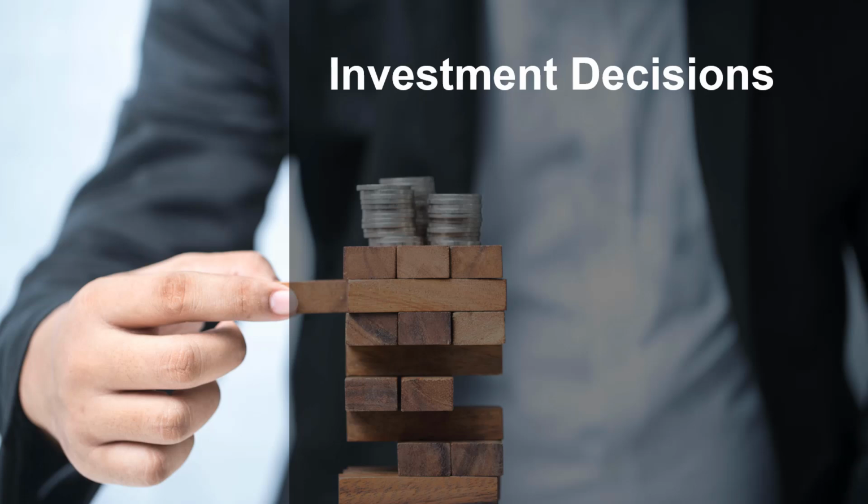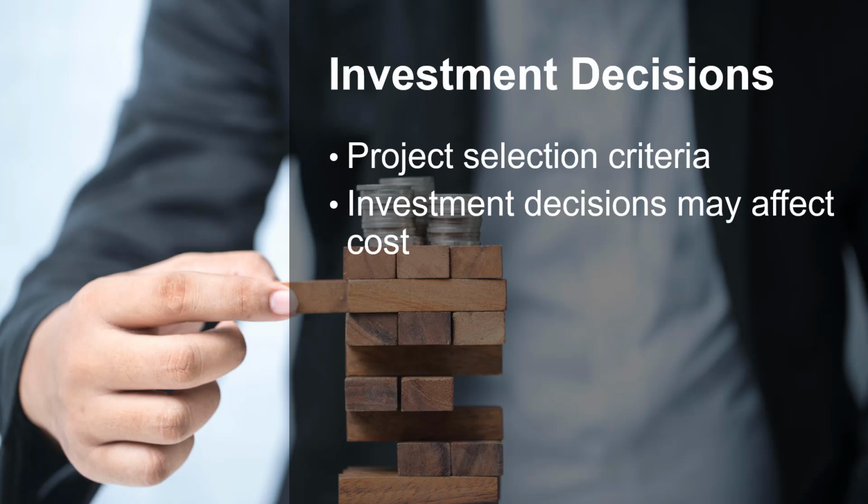options. Investment decisions are usually made long before the project gets to a project manager. Potential corporate initiatives are assessed based on high-level cost estimates, and the organization must first decide if they are using cash, equity, or debt to fund the various projects. Funding options, though, are revisited after more detailed cost estimates are developed. The PMP guide considers them to be part of determining the budget. However, as they affect project cost, they might cause you to revisit your cost estimates too.